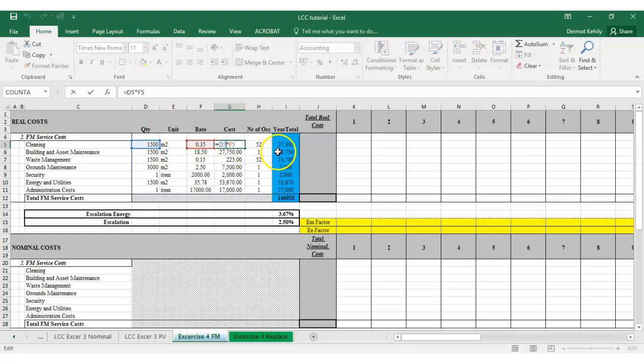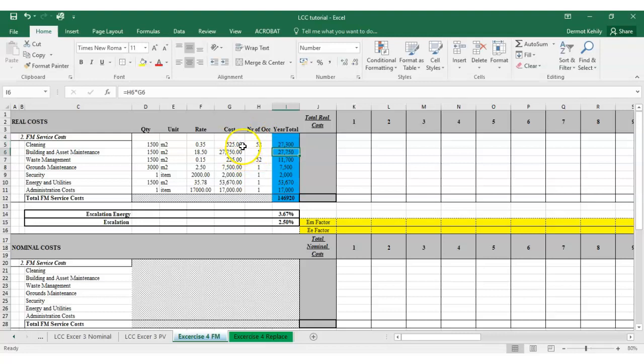That cost could be weekly, daily, or yearly. We want to calculate what the yearly total is: if it's cost per week, multiply by 52 occurrences; if it's already a cost per year, leave it at one; cost per day use 365, and so on. If I double-click the cost cell, quantity by rate equals cost, and double-clicking the yearly total shows the formula: number of occurrences times cost. Cleaning at 1,500 m² at 35 cents gives €525 per week, multiplied by 52 gives the yearly total.